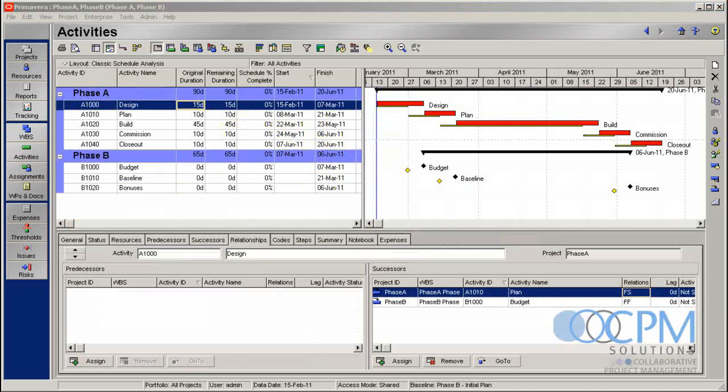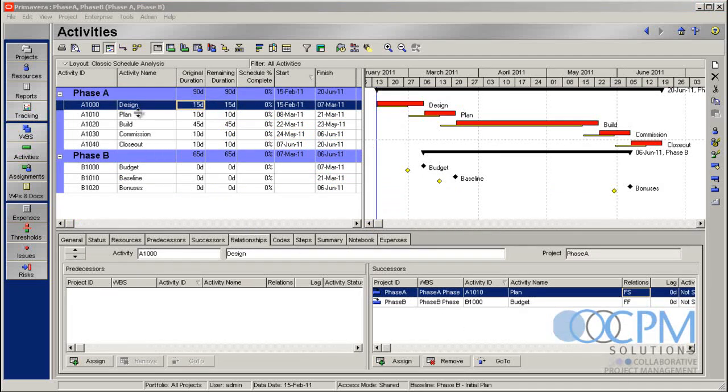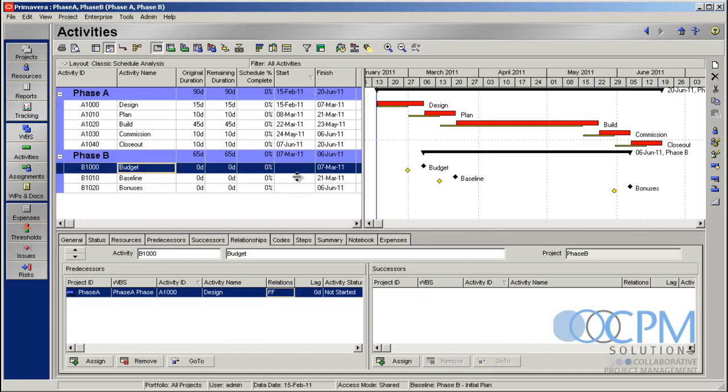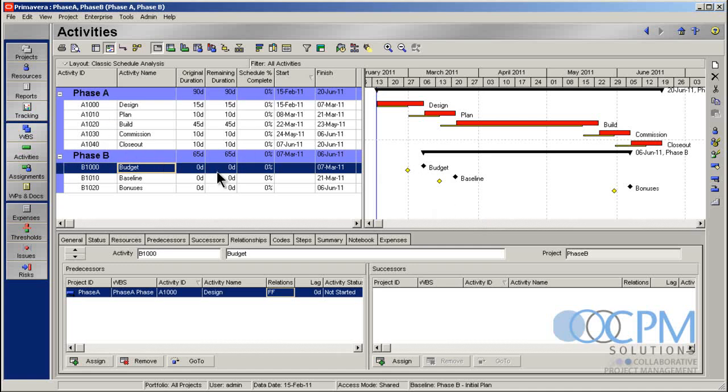Okay. Let's open up both projects again. So what I want you to start thinking about here is scenarios that you encounter all the time. Perhaps phase A belongs to a subcontractor. So they're off working in their own Primavera database with this data. And this data comes to you in the form of an XER export on a weekly basis perhaps. So you can see how you can have your section of the project linked to it. And when they send you an updated one, you just got to make sure you go into yours, open it up, schedule, and you can see the changes. Make sure you do a baseline first so that you recognize where things have changed. Okay. So this is the kind of process we want to start thinking about.